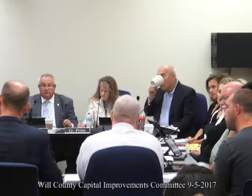So, we were still having issues with utilities. ComEd now has stepped up, so we're on track now with ComEd. Well, I don't know if we're on track, but we need to get on track, because certainly they can hold you up. We had an extensive and detailed meeting with them last week, brought in their engineers, and went through the schedule and the requirements. They're supposed to be out there today with some on-site inspection work underneath in the manholes. I haven't had a chance to go out there to see if they've got people doing that, but I will.